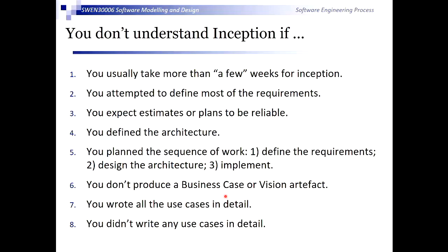Okay, so just to turn things around a little bit, you don't understand inception if, first thing, you take more than a few weeks for inception. So this phase is intended to be a few weeks. It might be a little bit longer if it's a very complex project, but it's an investigation phase. It's one where you put this vision down. You're not trying to develop the system or put the architecture in place. We'll get to those things.